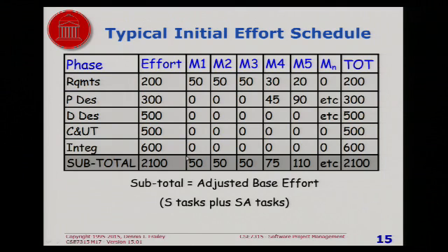Now, this is what it looks like for a waterfall. If you look at it and compare with the generic schedule for the waterfall that I showed you about 7 or 8 slides back, it looks almost exactly the same, except instead of percentages, we have numbers of hours. Or actually staff days, I think it is. Anyway, the effort vector is here, and the total is here, and if you did it right, the total should match the effort vector.